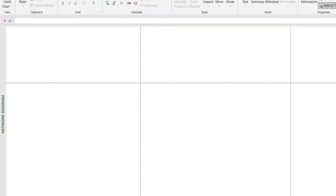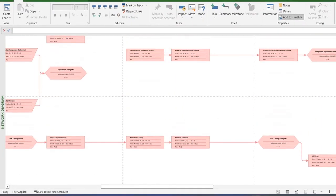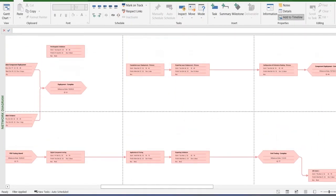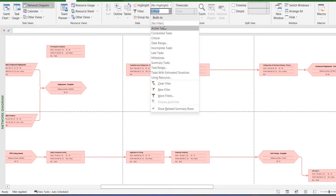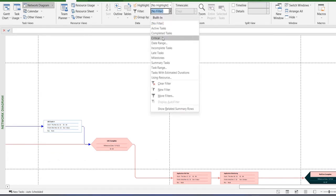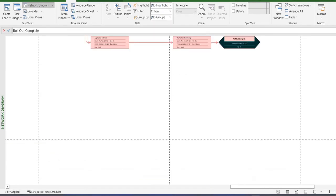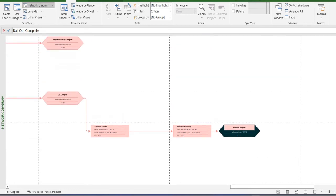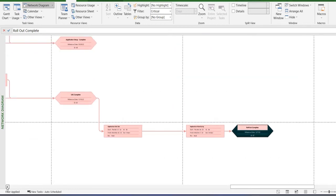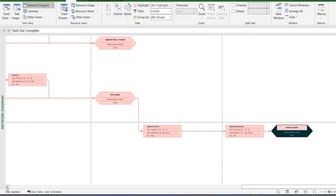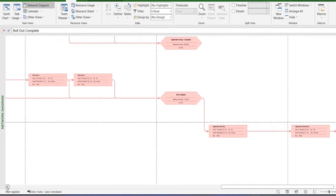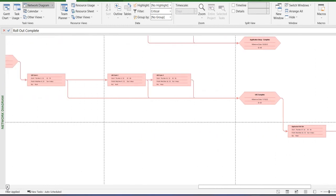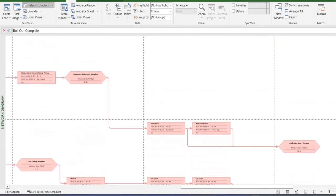These tasks are being shown to you because you selected the filter critical over here. If you didn't have this filter, you will see all the tasks. But the easiest way is to select the critical view or filter over here, and then head over to your network Gantt chart or network diagram, and it will show you the entire critical path of your project.